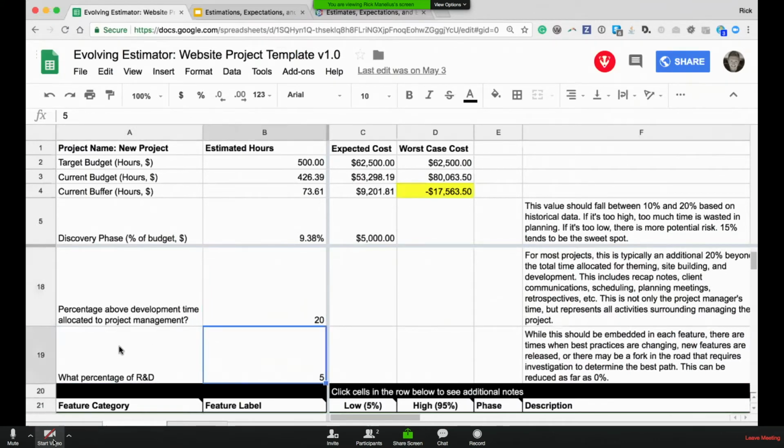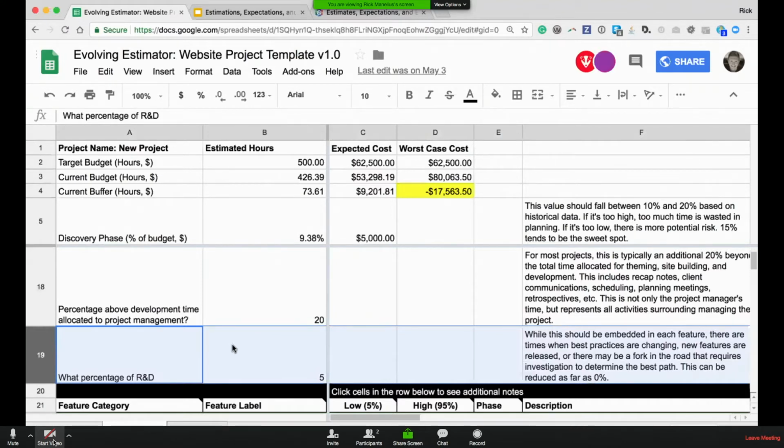And this is a good idea too. If there's a lot of uncertainty, like they're asking for features that you haven't necessarily worked on in the past, but they trust you that you need to spend some time researching domain access or organic groups or multilingual or whatever, you can bake that into the estimate as time that you're going to need based on overall feature size to just do research into those features. And again, you bake that into a per estimate.